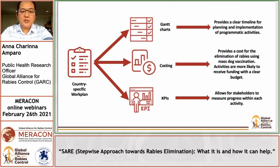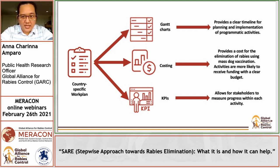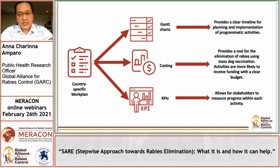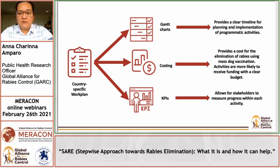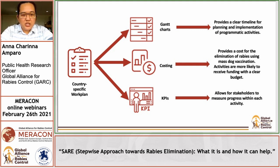The country-specific work plan will then have three major outputs: the Gantt charts, which will provide a clear timeline for planning and implementation of programmatic activities; the costing, which will provide an estimate of the cost for the elimination of rabies using mass dog vaccination — important because activities are more likely to receive funding if they have a clear budget; and key performance indicators, which allow stakeholders to measure progress within each activity.